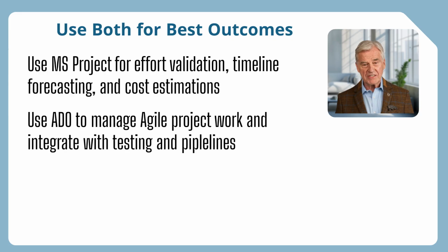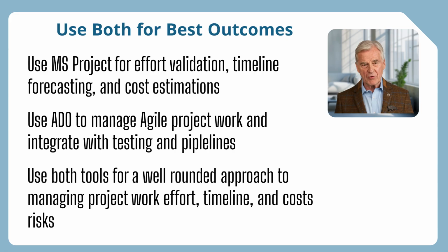Use ADO to execute the work and track real progress. If your goal is to deliver an agile project, use ADO. Actuals from ADO can also be used to update MS Project forecasts, which can give you full project end-to-end visibility. In summary, using both tools can more effectively reduce work effort, timeline, and cost risks than just relying on a single project management tool.